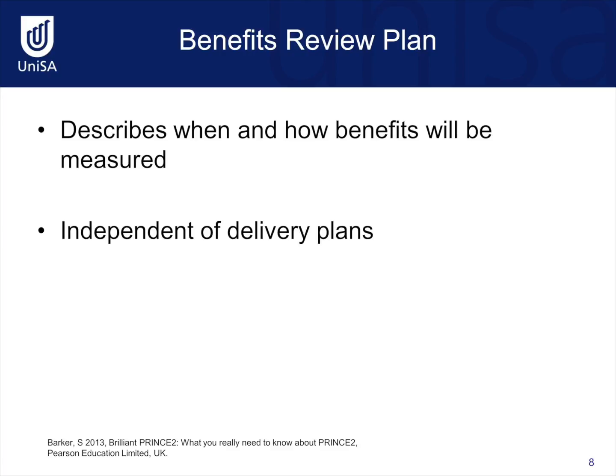It provides important information about when and how the benefits of a project will be measured. Benefits are not usually realised during a project, at project handover, or even a day later. They could be realised after 3 months, 6 months, 1 year, or even later. It's therefore important to have a plan in place that stipulates when and how each of the project's benefits are going to be measured, as well as who is responsible for measuring each of those benefits.